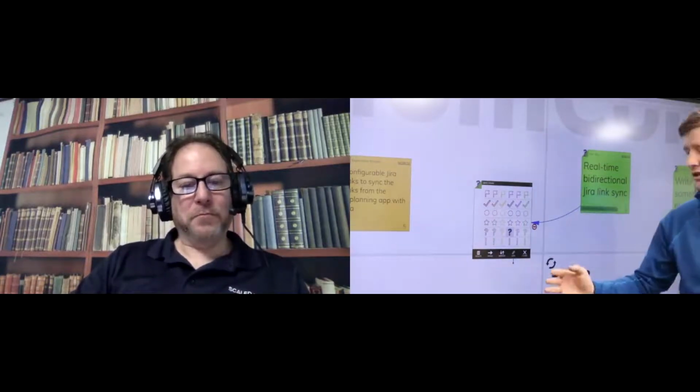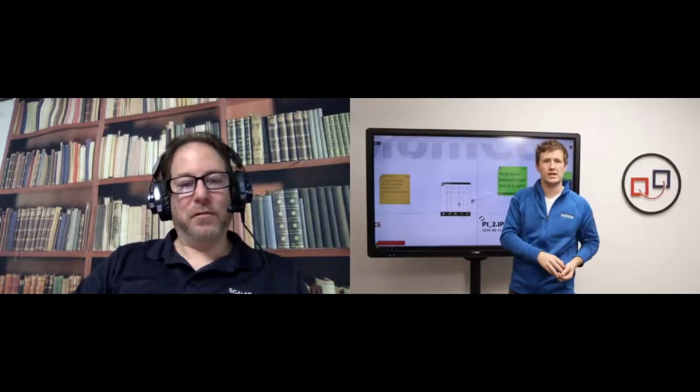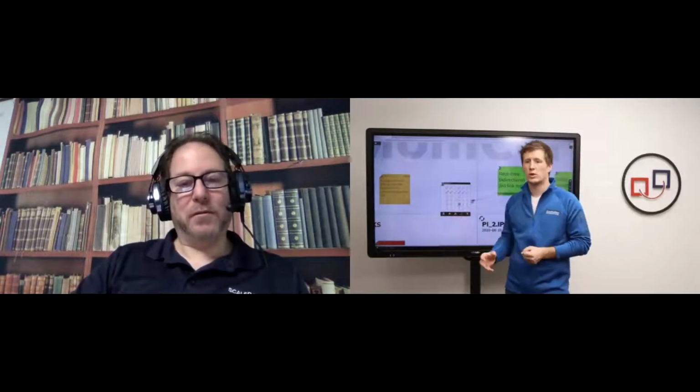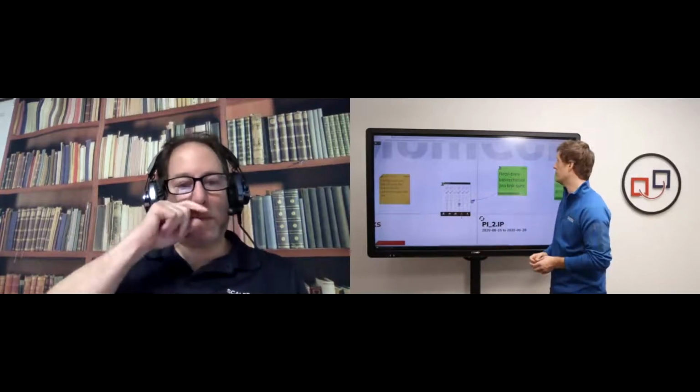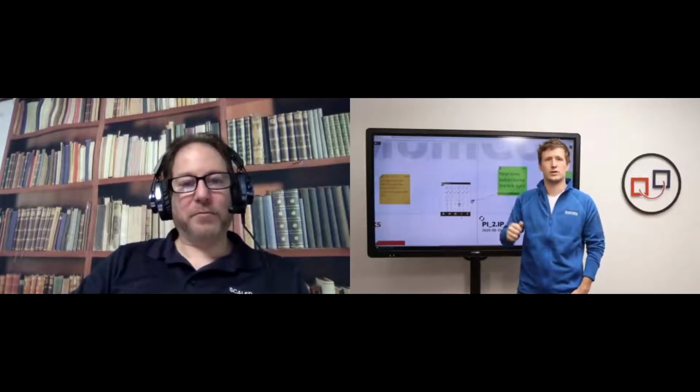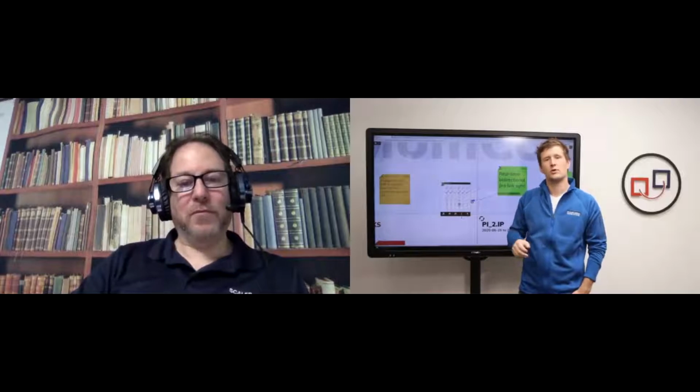So let's say the orange exclamation mark would say, we do have a problem which needs to get solved in our problem solving session. If it's a question, a blue one, it means product management: when you have time, please join the team to discuss this specific feature or this user story. So I think those stickers or any kind of additional visuals on the boards really support bringing up the conversations when they make sense and when they are needed.